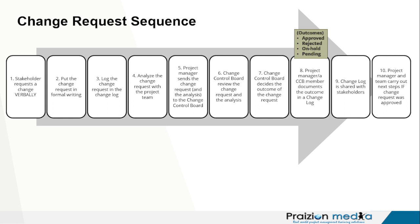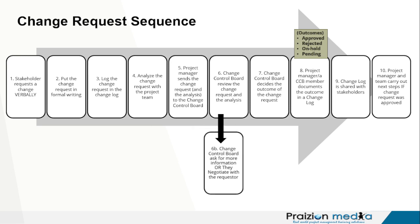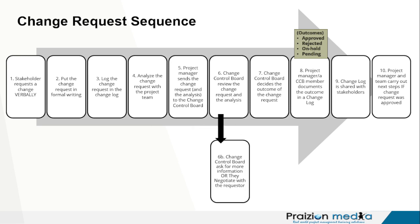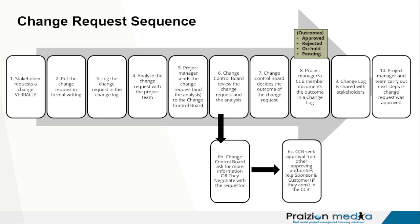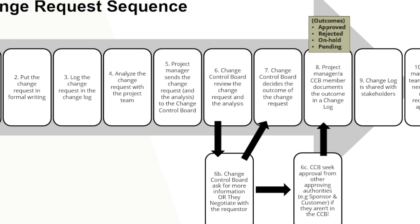The project manager can then carry out the next steps if the change request was approved. The outcome could be: approve it, reject it, put it on hold, or answer pending other information or other actions. Some of those actions could be getting in touch with a customer to negotiate something different. Another offshoot could be seeking approval from other authorities like the sponsor and the customer if they are not in the CCB. This is the mindset that will really help you on your exam.